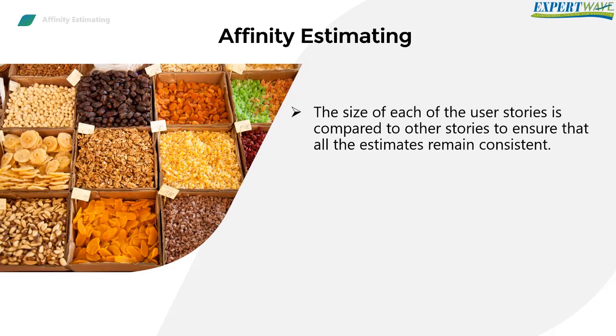Then the affinity estimation. The affinity estimation is not exactly an estimation technique, but rather a technique that is used to group similar user stories in size together to ensure that all estimates are consistent.